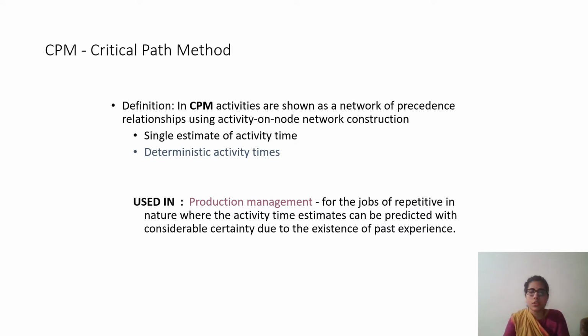final output. So it is basically used in production management, construction management, design, architecture, etc., where the jobs are repetitive in nature. So after 2 or 3 years of experience, I can easily say, okay, I need this much time for laying my tiles. Right? The activity times can easily be predicted because of past experience. Only if I can predict exact activity times am I going to use the CPM method. So most of the repetitive tasks can go with the CPM method.